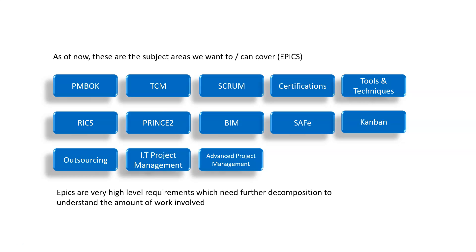Within the payment module it has to be decomposed further: credit card payments, cash card payments, payment through gateways like Google Pay, then within credit card — Visa, Mastercard — multi-currency, payment failure handling, refund policies. Payment processing remains an epic, while all these specifics become user stories. So epics get decomposed into user stories. In our case, PMBOK videos, TCM videos, and Scrum videos are all epics because we don't yet know how many videos each requires.